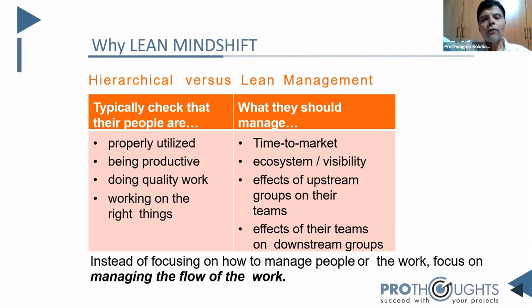We need to move beyond. Those are taken for granted. Why? People know we need to produce 85%. 8 hours we are working, 7 hours minimum we need to put. Week on week 35 out of 40. And bill the customer. Fixed price project, T&M project, we don't care. Our organization mandated that a minimum 85% billability should be there. Out of 85%, my productivity should be 98% as a KPI, measured week to week, or maybe iteration to iteration, every 2 weeks.